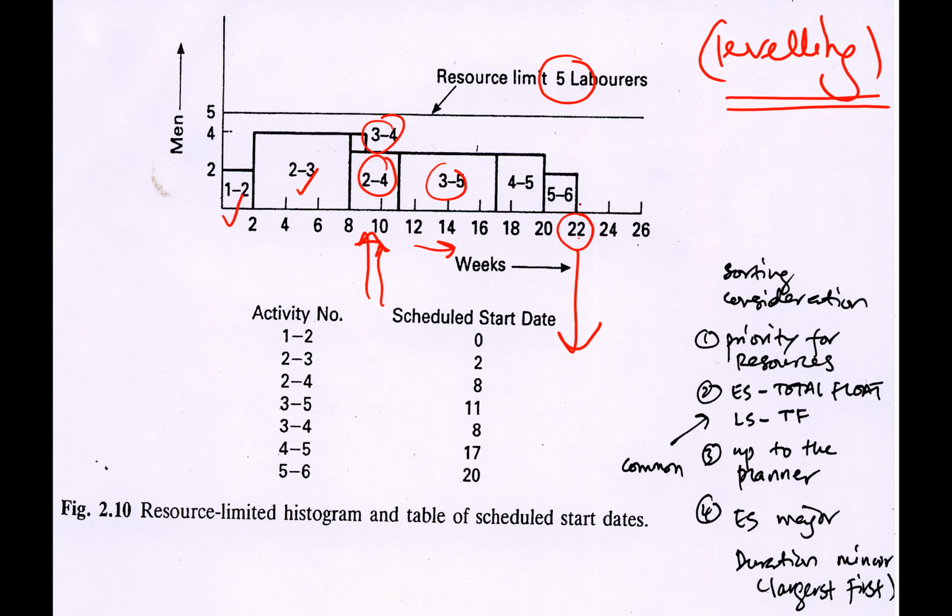So this could be the better solution, because you don't have to have a headache getting extra people working at the construction site, and then needing to fire them the following days. Why not? Because with scheduling, we are the ones that come up with the schedule. We are the ones that resolve the issue that we have. Okay, so this is what we call resource leveling.